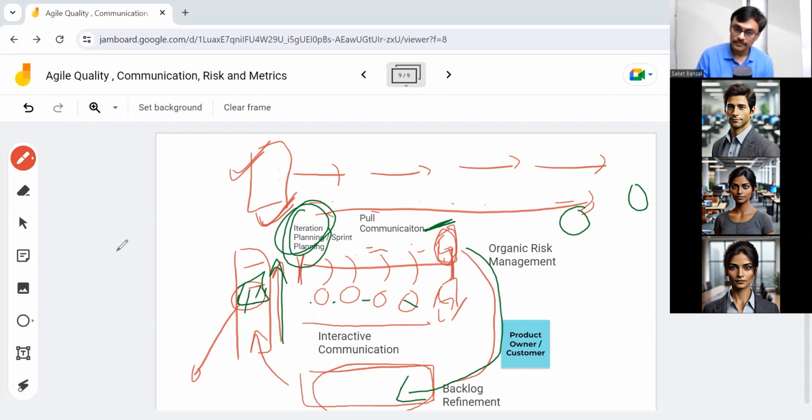So what is the recommendation around product refinement? How often should you do it? From a Scrum perspective, Scrum only gives one recommendation: up to 10% of the team's time can go into refinement. So if you are running a 10-day sprint, then 1 day goes for refinement. That's overall, a maximum of 10% of the time.